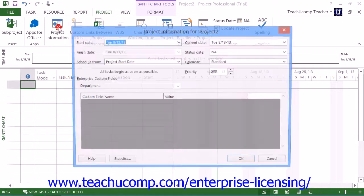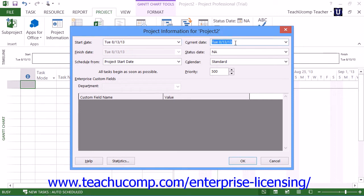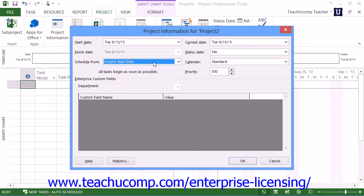A project plan allows you to set the basic parameters for the project file. In the Project Information dialog box, you can enter the Start Date, the Current Date, and then select Project Start Date from the Schedule From drop-down menu. This allows Microsoft Project to track tasks from the given start date.